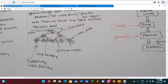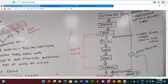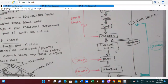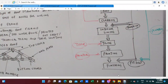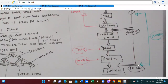This is the construction steps. First, we have to set up the provision for the underground wiring and the bailout supply. Then we have to do the footing, base, floor, wall, roof, and the cladding. After that, the brick layer — the underfloor cable, then electrification takes part. After the interior landing, rushing in, tiling, and interstate tiling. Finally, the painting and the final finishing. So the whole plan — the whole step plan has to be carried out. This is the step of the building construction.